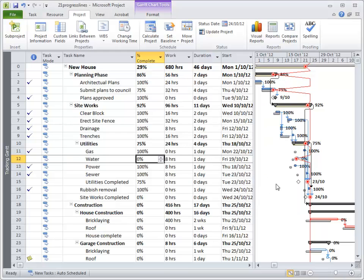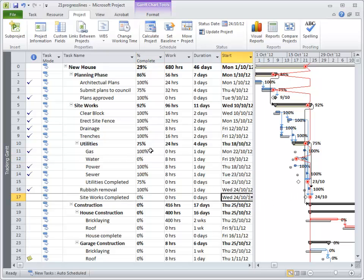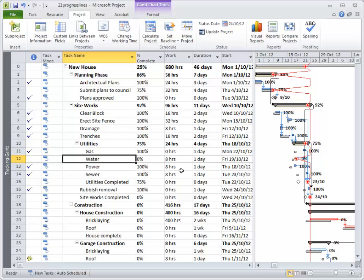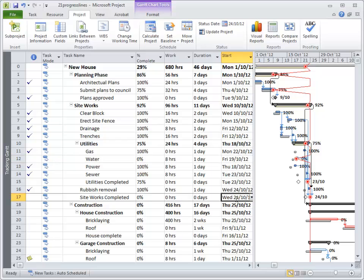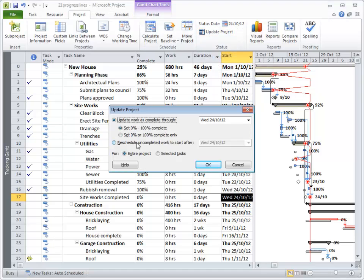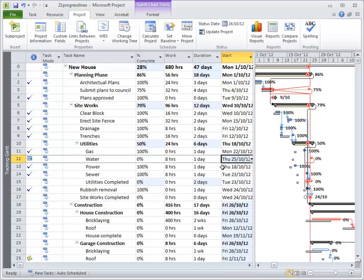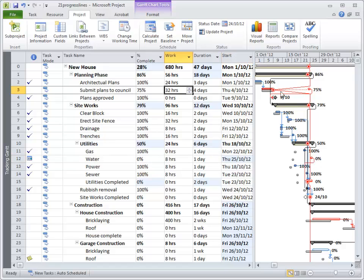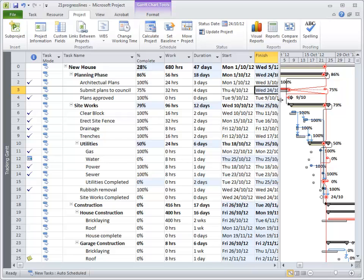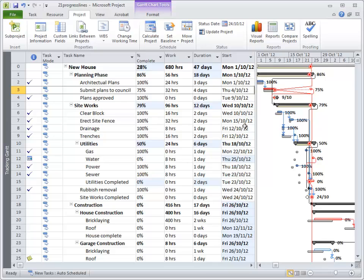The other thing we need to do with the project is update it. So if it was the 24th, those items in the past weren't done — the water's not going to happen on the 19th if today's the 24th. So under Project we go to 'Update Project' and reschedule work uncompleted to start after the 24th of October. Watch what happens to 'Water', which was meant to happen on the 19th — it's now changed to the 25th. The progress line has moved that task into the future. It's also moved the council plans one day's worth of work, because it was only 75% complete, into the future, scheduled on the next available date, the 24th. So that's the earliest this will now be done. That's using Update Project.